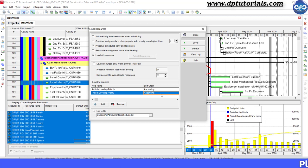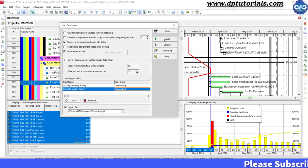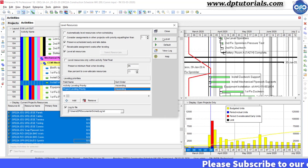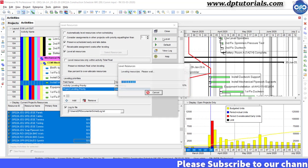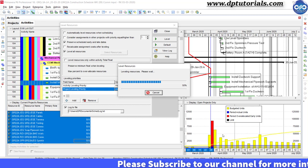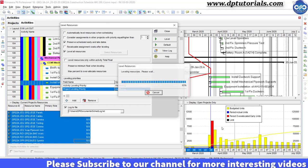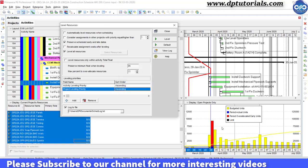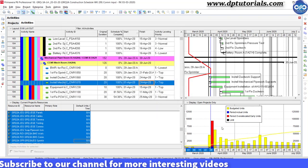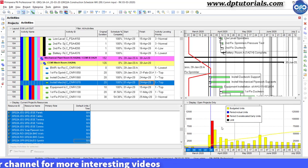Once you are done with the selection of required options for leveling, click this level button to start the actual process. You will notice that P6 Professional will move activities in order to eliminate or at least reduce the resource overload issue.